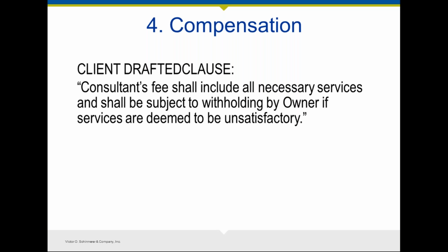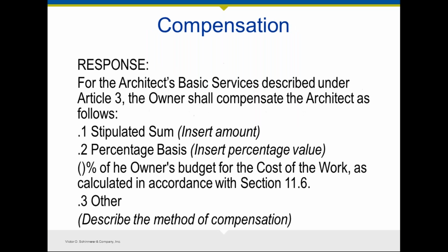So if there are additional services that are required, your fee should ultimately be adjusted accordingly and your scope amended accordingly to take that into account. So don't forget the additional services that may be required during the course of a project. If you handle that well and you manage the scope creep process that's almost inevitable in a lot of projects, and make sure that it is addressed, so that if there's additional responsibility you're taking on, it matches up with the fees, then that's certainly an excellent way to handle the risk.